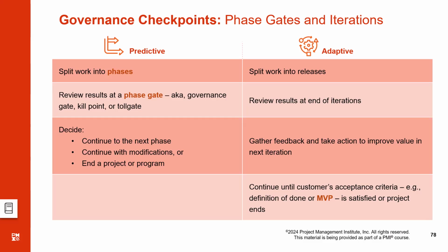In Agile, something closest to the phases is called releases. So our Agile project is split into releases, but releases are not phases. Phase actually includes the work. Release is actually a point where a specific product is to be delivered to the customer.